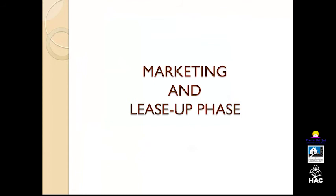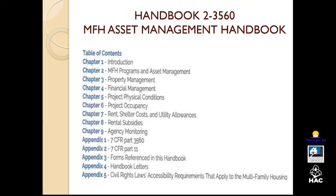The other aspect is to make sure that you plan ahead for an 11-month walkthrough so that the warranty period doesn't expire before you have that walkthrough and provide the contractor with a final list of repair needs. And so that is going to help you make sure that the contractor performs all of the aspects that are necessary to keep your project in good shape, and that all of your warranties are going to stay in place.